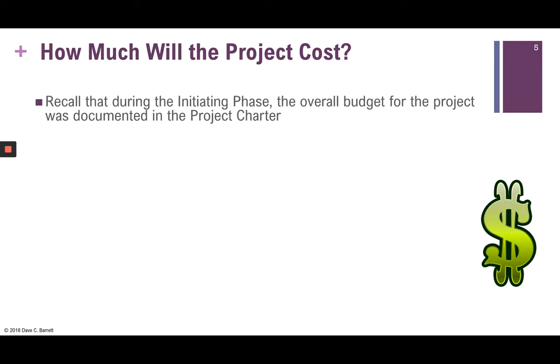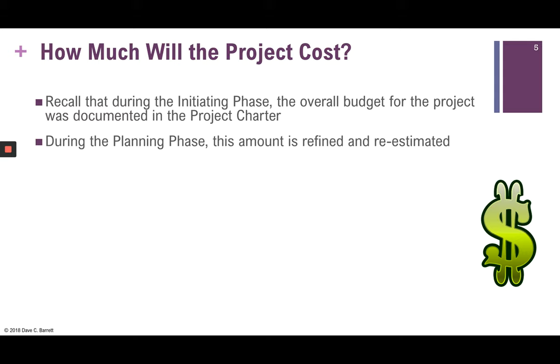First of all, how much will the project cost? Recall that during the initiating phase, the overall budget for the project was documented in the project charter. That starting budget can come from how much has been allocated or the maximum amount available. But often in the initiating phase, not a lot of analysis has gone into that number. So during the planning phase, this amount is refined and in some cases re-estimated — sometimes the budget number may not have been reasonable, too low or even too high. It can be re-estimated and adjusted.